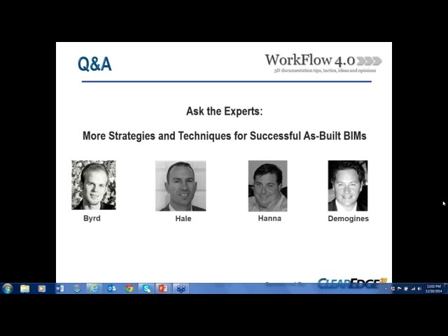Yeah, just as far as the original question, what to include in your proposal, like these guys are saying, there are some resources out there that have some recommendations. On a basic level, it's laying out how long your scan project is estimated to take, including the time back in the office and processing, and the costs associated with that. And then some of the things which I think we've all also covered, in the beginning stages of planning your project.